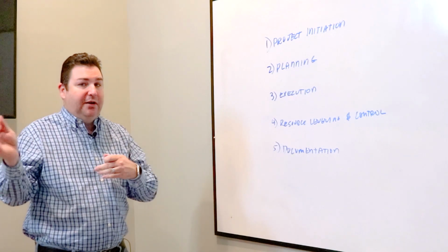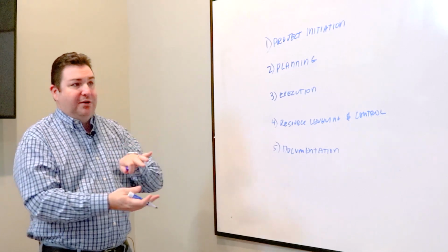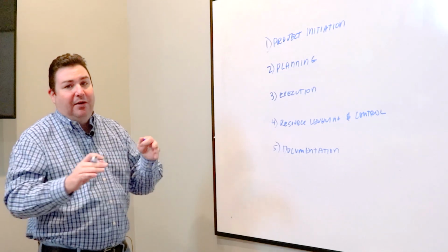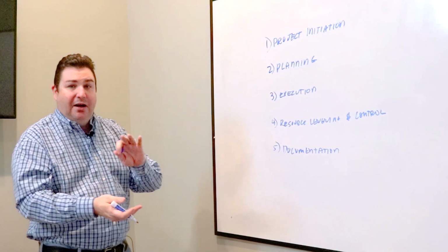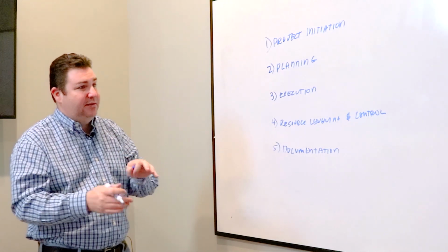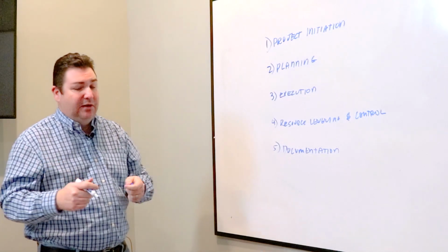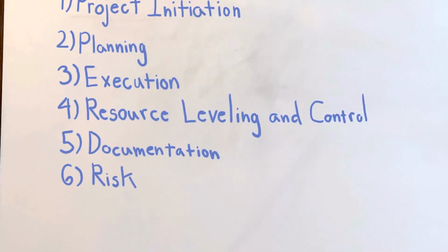A lot of people will go conduct a project meeting and there's no project status report that comes out of it, or even just meeting notes. But you have to memorialize what was said and done and agreed to during those meetings inside some formal piece of communication. So as we move down the list, number 6, risk management, right?